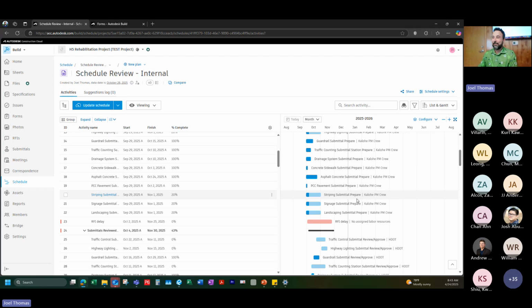One thing that commonly comes up is if the contractor is delayed and we'd hope to accelerate their progress or meet the contract date. If they have critical path items that are in series, but those work items don't depend on each other being done, it's just how they plan their crew sizes, they could do some of those in parallel if they have the resources available. So getting them to tell you what their resources are up front allows you to do that analysis, and everyone can speak truthfully. Totally agree.